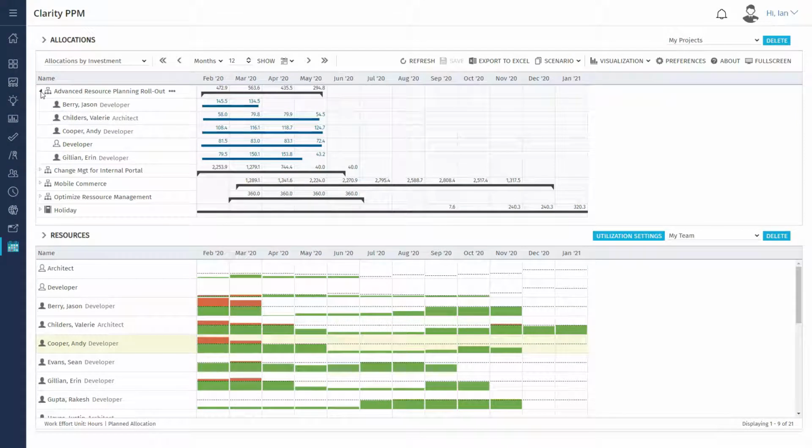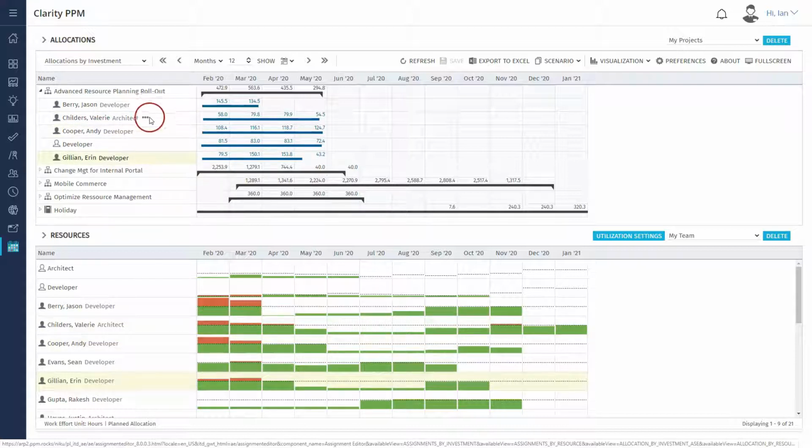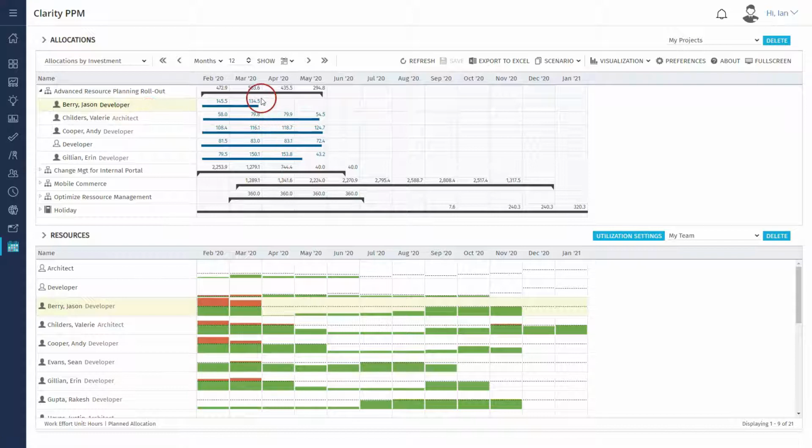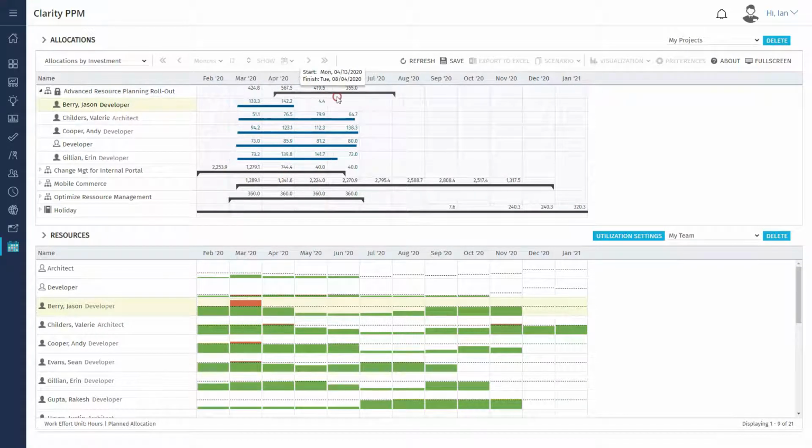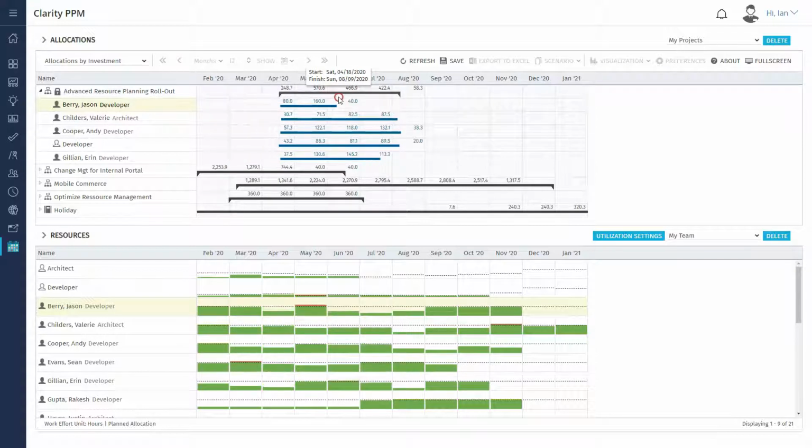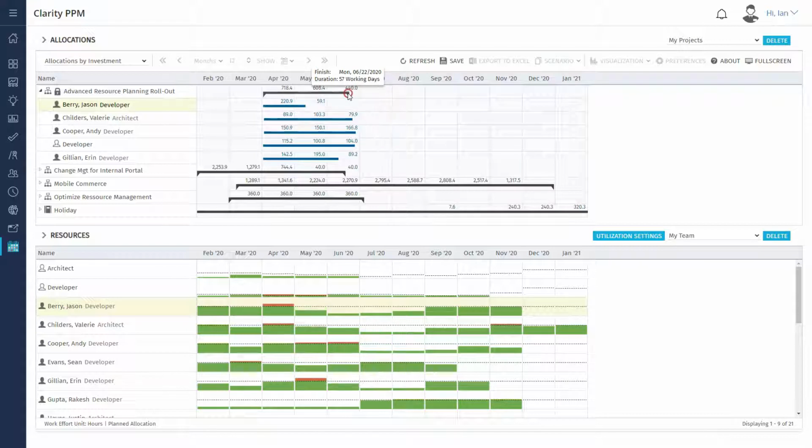By clicking on the respective resource, we can select it in the resource section on the bottom. With this, we can get an overview of their capacity. Every change you make in an investment is shown directly in the resource utilization. This helps, for example, when you have to choose when a project still fits in. You can stretch or shrink a project, or simply move it to the left or to the right. We also have the chance to change single resources in the same way.